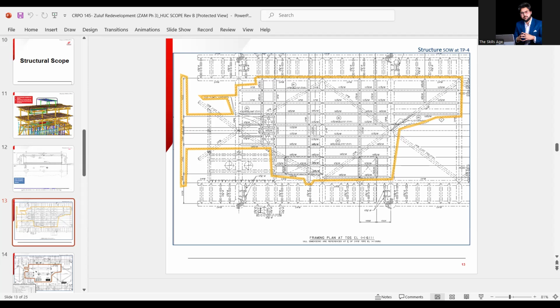I'm showing you right now so that you can witness it and get a grip on what you require for the tendering process. You got my point? These are the documents you require. You will be given them by the client, and then you have to work with quantity surveyors and your estimation people. You have to take all the quantifications, put in your effort and rates, and conclude a cost for tendering purposes.